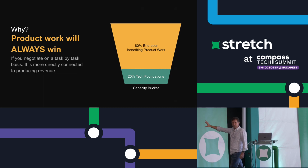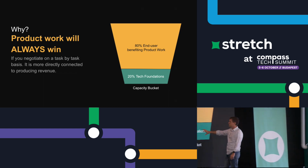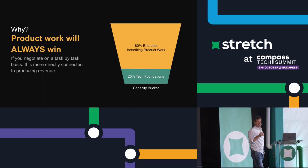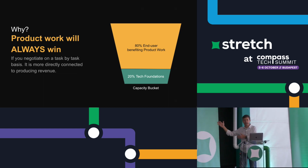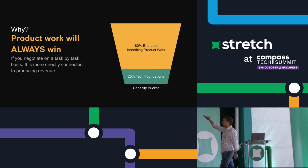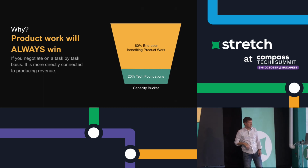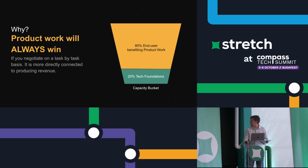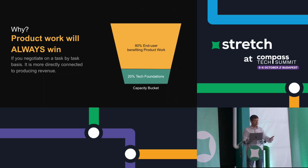Now, I put up 80% and 20%. That is what I do with my teams. The situation of your particular company could mean that this could be different, so I'm not being prescriptive about the amounts here. This is what works for me and my teams, but it could easily be 25%, it could be 15%, something like that. One thing's for sure, it's probably a lot less than 50%. You're not going to secure an agreement that it's going to be more.